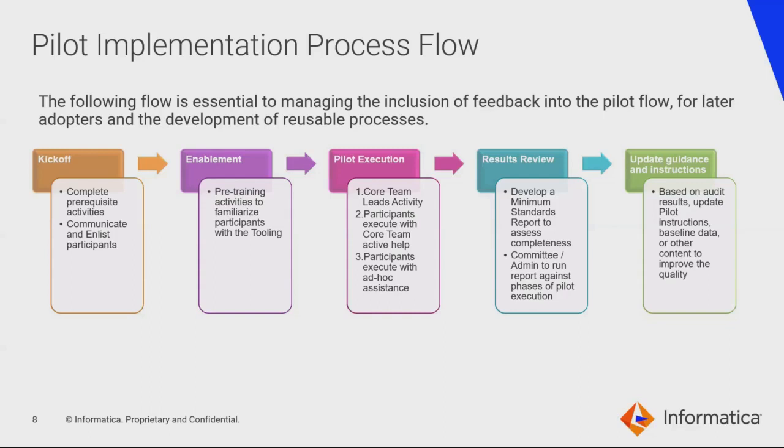Then we look at building an initial dashboard for the standards. We want to look at how quickly people were able to get through a workflow. Did we have high quality? If we had change requests implemented, did we meet the SLA for that change request? These things will help us really understand how well the pilot's working. And then finally, from that, updating guidance and instructions about the pilot so that we've got a good feedback flow into running the next one.